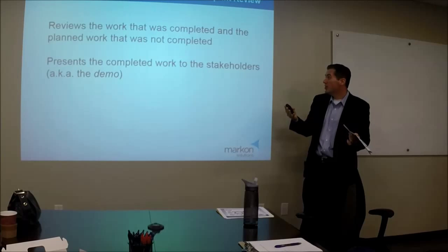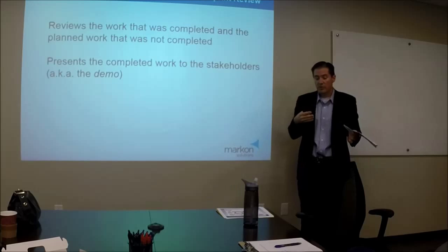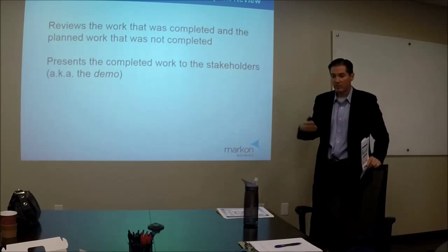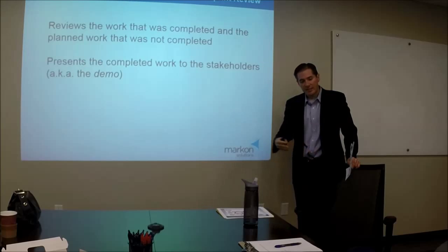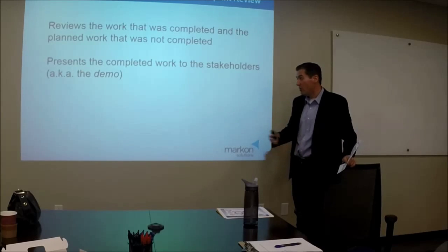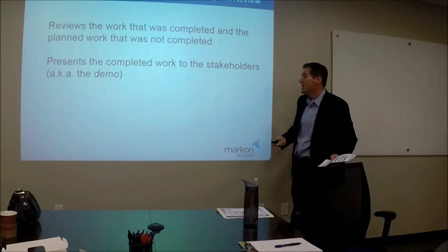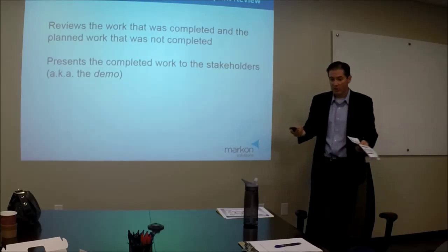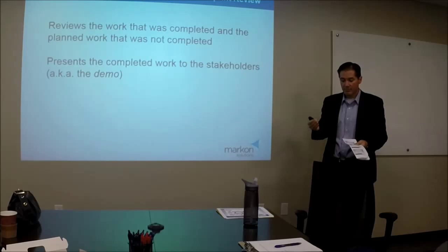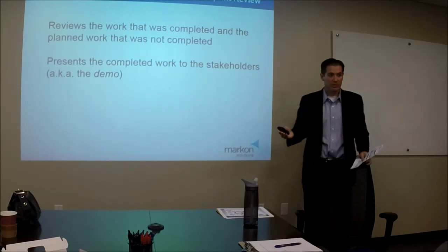So basically, you review the work that was completed. You review the planned work that was not completed, so you're real honest about that. Hey, we thought we could get to this, we did not. Well, why didn't you? Okay, well, here are some reasons. All those kinds of cycles. You present all completed work to the stakeholder. That's like a demo. The whole time, you are getting feedback from your product owner.